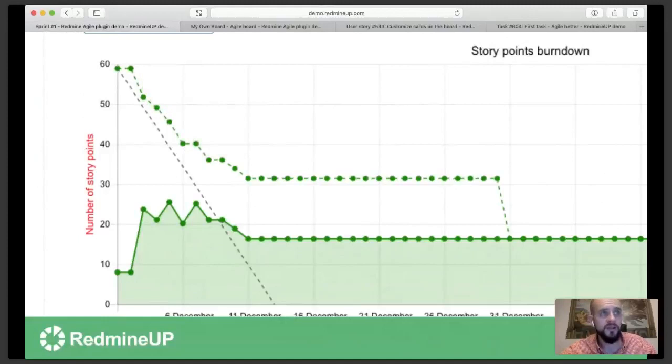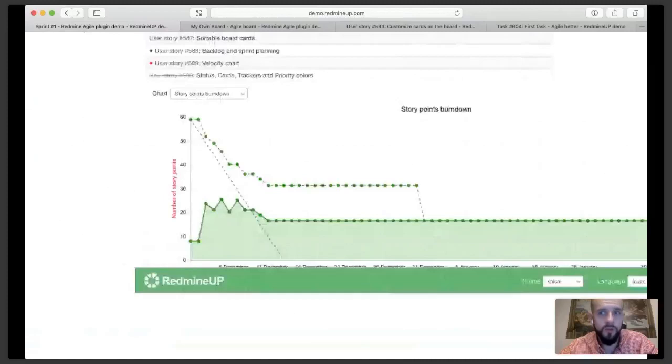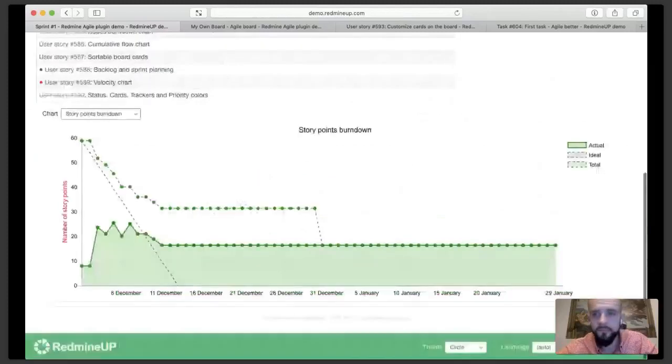The spikes that you might see will appear when you add some new tasks on the go. That will also keep a good history, because even though your team might have been working on completing the issues, someone from management or the client, the project manager, or the product manager put things on your stack, so your team might not be able to deliver them on time.